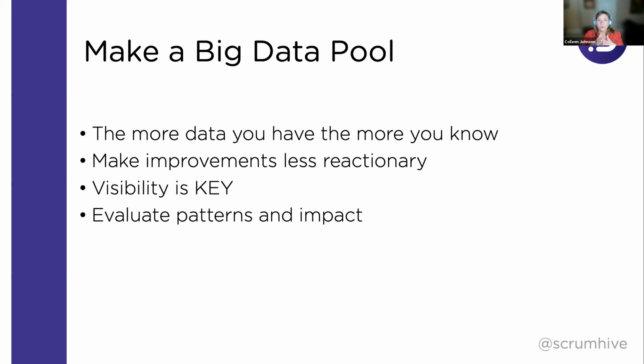And that way, over the course of the quarter, we were pulling all this data from different teams into this Google Sheet. And when we went to do our system level retro or our program retro, we pulled this sheet up and we had 3 months worth of retro data here at a rolled up level where we weren't disclosing any of the cards or any of the verbatim feedback that was coming from the team, but we were escalating up those common themes and patterns.